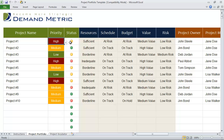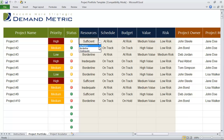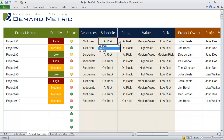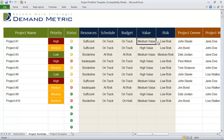The status button is automatically generated based on the items in blue here: resources, schedule, budget, value, and risk. All you have to do is use the drop list provided to indicate their status. For resources, if it's sufficient, we indicate sufficient. If the schedule is on track, we select on track. Same thing goes for the budget. If it's a high value project and low risk, we'll see that the status indicator has changed to green.